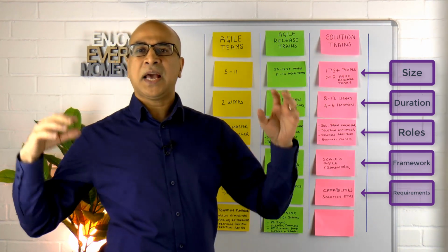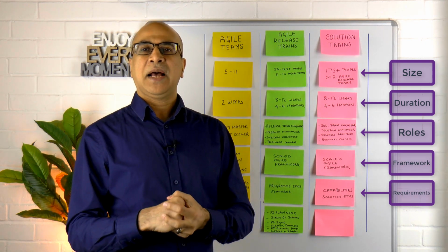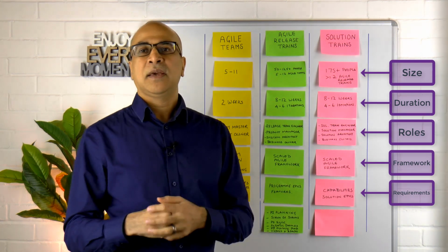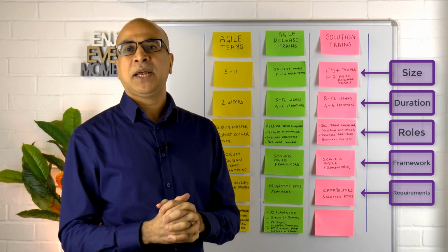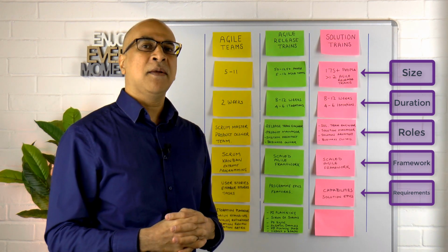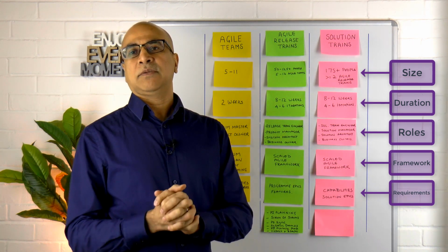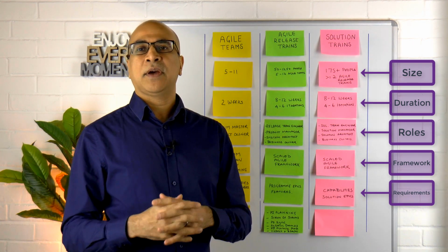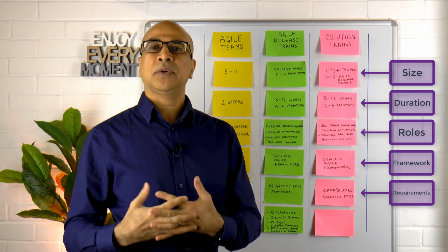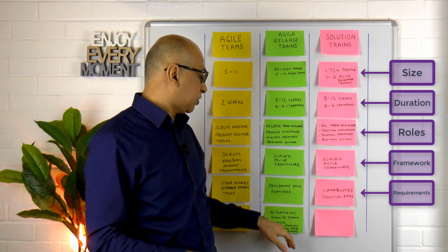Scrum of Scrums. We have all of the Scrum Masters coming together and discussing how they can make sure whether they're on track for the plan that they came up with in the PI planning, and discussing any dependencies and impediments over there. And then we have also a similar PO sync, which is for product owners coming together to discuss any changes in terms of the scope, in terms of the order priority that may have come about as a result of the executional challenges during that.